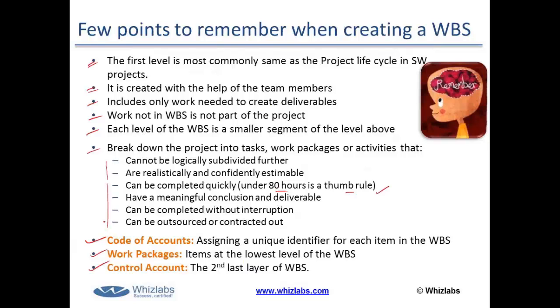The unique identifier for each work package element or work component in the WBS, that's called code of accounts. And control account is mainly the second last layer of the WBS, one or two layers higher than the work packages, wherein we do the monitoring and controlling of the project.